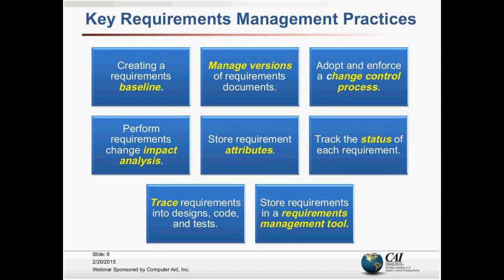In addition to the statement of an individual requirement, one thing we might want to do is store requirement attributes — additional bits of requirements knowledge that go beyond the statement of the requirement and give us a richer understanding of each one. One of those attributes might be the status of each requirement as it goes from concept down to ultimately being implemented and verified in the product. Another important part of requirements management is to trace requirements into all of the downstream deliverables we create because of them — designs, code, tests, or other things created because a requirement exists.